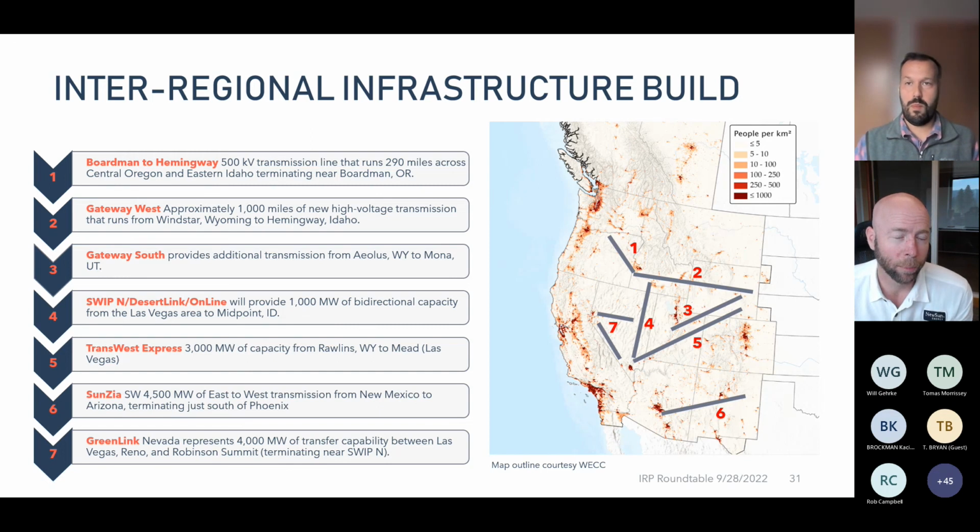Yeah, I appreciate that. I would just say, first of all, none of those transmission projects help you an inch without new Bonneville transmission over the Cascades, right? Which are all 15-year projects. I'll highlight number 4 there, the SWIP. We saw a presentation in Alderbrook recently that pointed out that project was conceptualized in the 70s or maybe the 50s for that thing to come into reality.